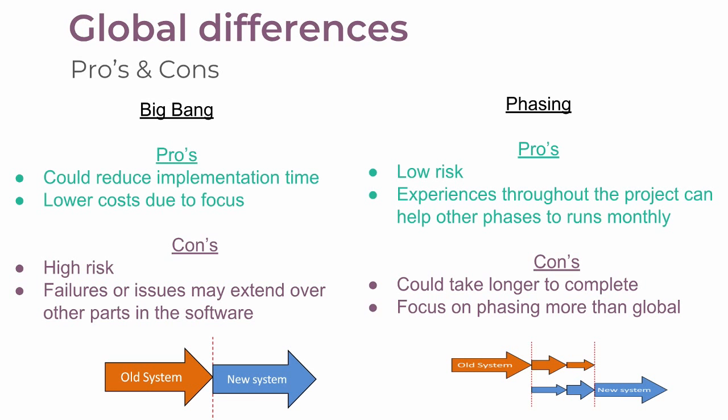The downside of that is that there's a high risk that, for example, the customer changes his mind, or that the specs were not written down perfectly, or that actually it's what he wants but not what he needs. So you come, you deliver something, and the customer sees the result and it doesn't perfectly fit what he wants. At the same time, if you deliver something and there's one failure somewhere in the system, it can have impact elsewhere in the solution.